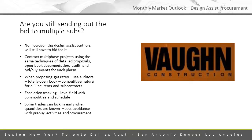Something that we get from these partners early on in the process, like when they propose on the job, is labor rates, crew rates, burdens. That's one of the reasons why we like to have auditors involved on our design assist projects, so we can go through all that stuff early. And those rates are things that they use in their estimates. And so we're able to check, not only is the material and equipment totally open book when we get bids from them, but we're also evaluating the labor that they've been carrying with them throughout pre-con as we're doing estimates.